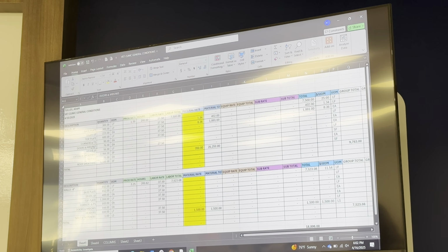Those little subcontracts are all self-contained. As a general contractor, you start to think of it as almost passing through this cost. I get my price for drywall, I pass it on to the owner, we trade dollars, I really don't have any risk here. So where do you have risk? It's in the general conditions. That's what drives whether or not you're going to make your full fee more than any other line item, which is principally based off duration. Get the duration right up front, don't lose time on your schedule, and your GCs are probably going to hold up, but they do need to be accurate in the first place. So let's start lining those out.